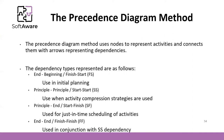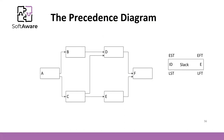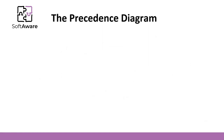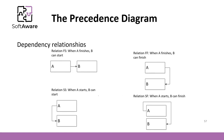What kind of dependencies can we have? The typical one is Finish-to-Start: once an activity finishes, the other can start. But we can consider other types of dependencies. Start-to-Start: when an activity starts, the other can start. Finish-to-Start: when one starts, the other finishes. And Finish-to-Finish: once one finishes, the other can also finish. Here we have an example of the precedence diagram where the tasks are in the nodes, and you can represent all four dependency relationships: Start-Finish, Start-Start, Finish-Start, and Finish-Finish.